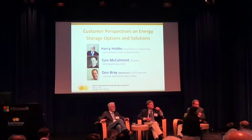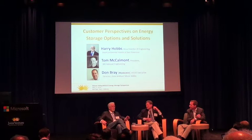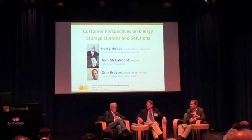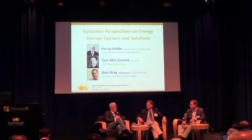Harry, how did your interconnection process work? Much the same as his. Several of the same speed bumps occurred along the way for us. I haven't thought through and put it in exact weeks, but I want to say 12 to 16 weeks in the process rather than what you experienced. But a great deal of that was based on the relationship that we'd already established in the community and with Pacific Gas and Electric.